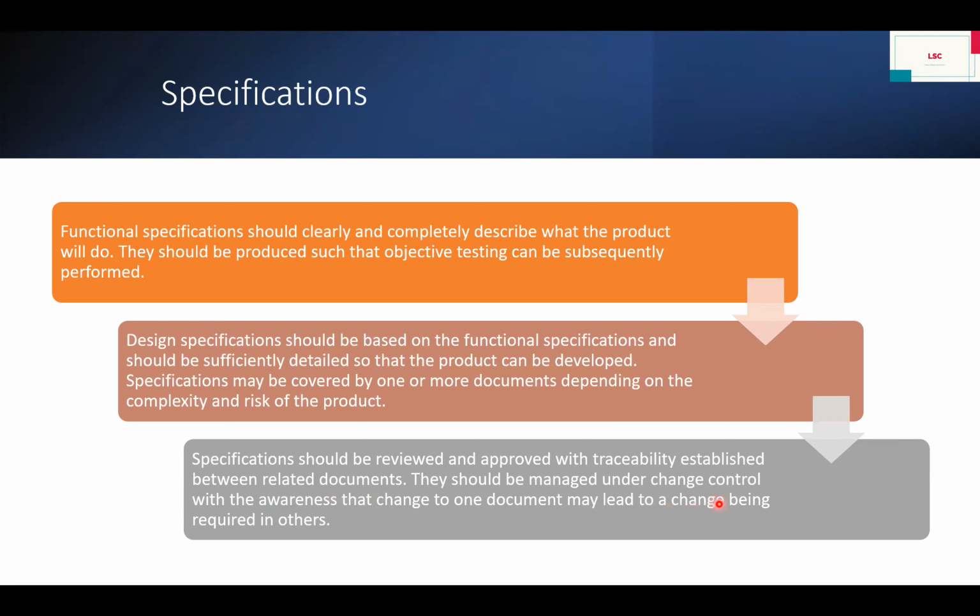They should be managed under change control, with the awareness that a change to one document may lead to a change being required to others. If you are going to use a change management system, impact assessment and all the documentation should be assessed properly, and if the change is applicable to that document also, it is going to be impacted.